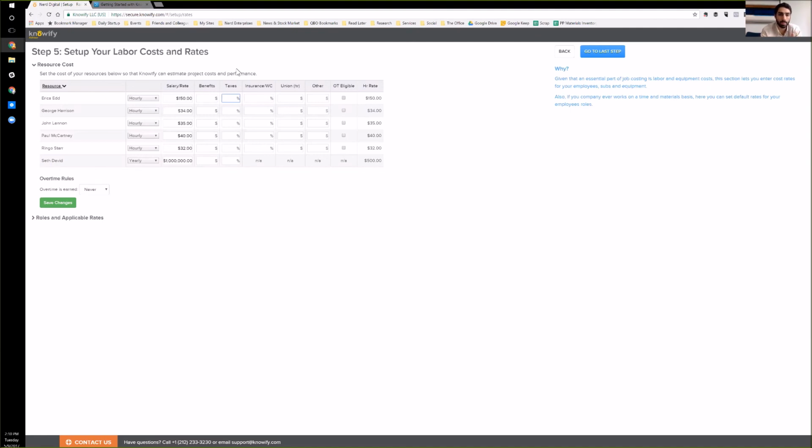Oh, I see. So if I wanted to sort of tack payroll taxes on to what I bill clients for her time, it will do that, right? So if I said taxes would be 7.65%, right, for Social Security, Medicare. So, are you also calculating her pay for payroll purposes or no? No, what we push to QuickBooks is just hours. Everything you do here is strictly job costing related. I gotcha. All right, so I wouldn't want to mess with that then. Let's get that out of there.